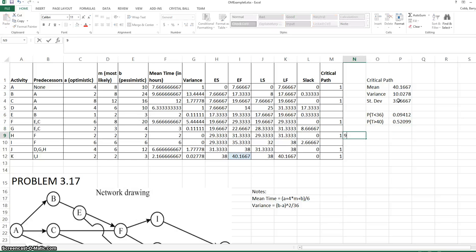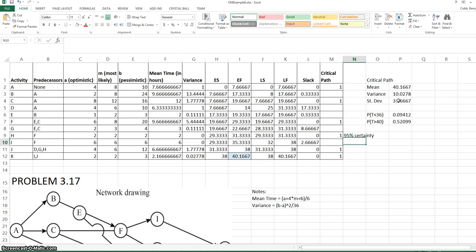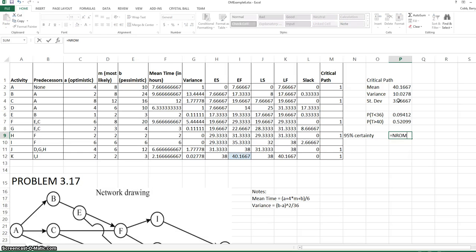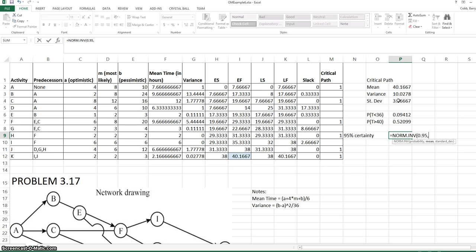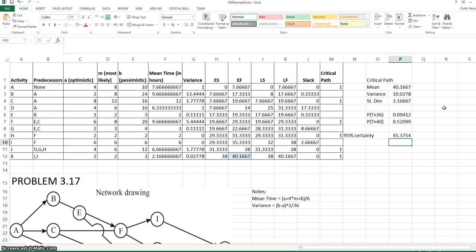We could also find the probability, for instance, of the day in which the project will be completed with 95% certainty. This is done with the NORMINV function. We enter 95% as our probability, our mean, and our standard deviation. So there's a 95% probability that the project will be completed before 45.4 days.